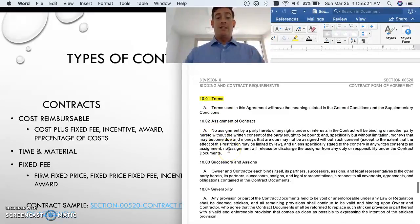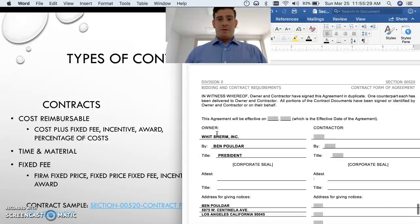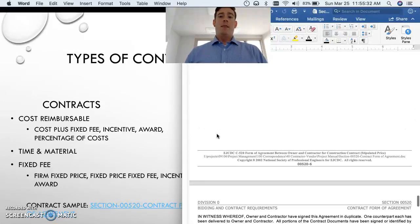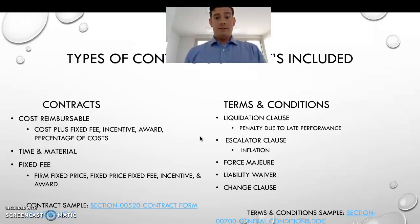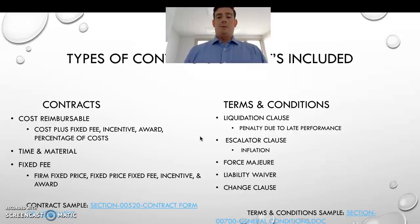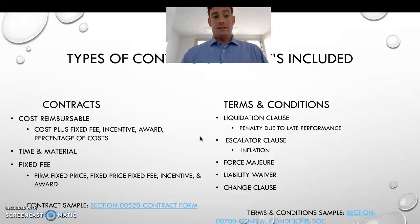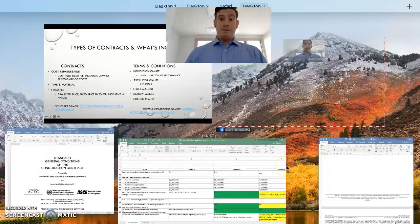Terms are a key portion of a contract - certain words are used and everyone has to understand what they mean. Assignment of contracts, successors and assigns, severability. Terms and conditions include the liquidation clause, escalator clause, force majeure, liability waiver, and the change clause. Force majeure is something out of control of both parties - neither one's fault - such as natural disasters and so forth.